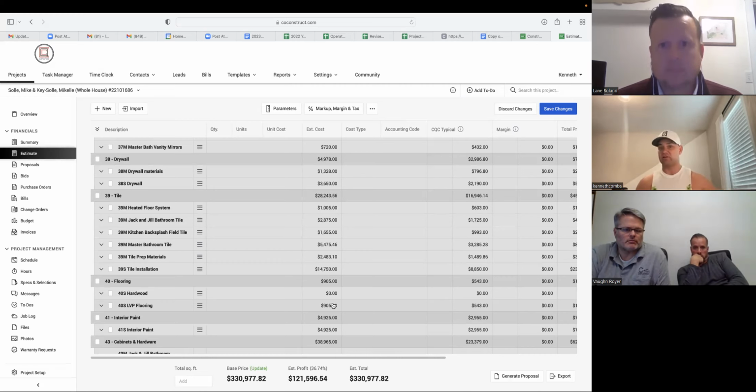So if they sell a $50,000 change order, just like we did last week, a house had a sag in a floor, and they wanted us to do an $80,000 bathroom. My guys would have done this in the past, but they were like, well, we're not going to put this bathroom on this sinking floor. So they went into the crawl space, investigated, and it ended up being like a $48,000 change order to put a triple girder under the whole house and jack up the center of the house. We made like 70% GP on that change order, but that was all done by the PM. It was all instituted, done, sold, communicated to the client, then given to the PD, added to the contract, and then they can make up some GP.